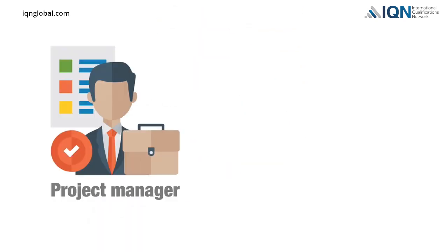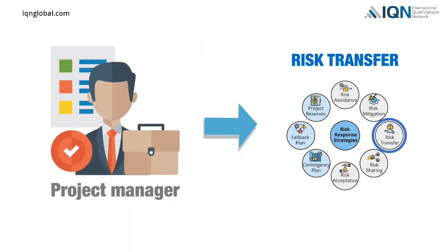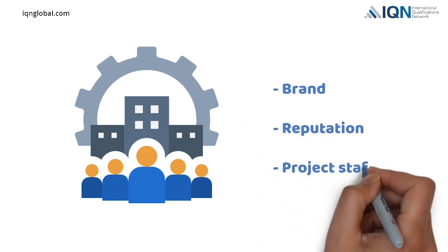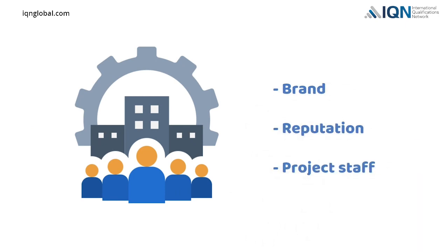Unfortunately, the project manager can use risk transfer strategy only for certain types of risk. Risks related to an organization's brand, reputation, and project staff can hardly be transferred.